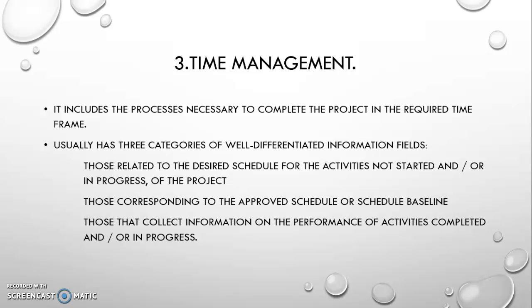This database usually has 3 categories or well-defined information feeds. Those for the activities not started and or in progress of the project, those corresponding to the approved schedule or schedule baseline, and those that collect information on the performance of activities completed and or in process.